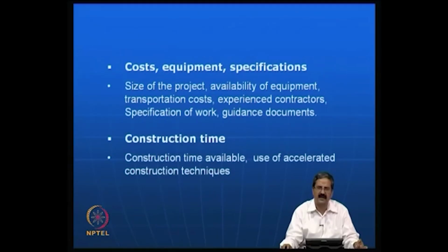There are many people in this business, and all should understand the principles of the ground improvement techniques and also how it should work in a given situation, and discuss thoroughly. So, the guidance documents will help you a great deal. Otherwise, there will be a lot of conflicts between the owner and the contractor and the supplier and the actual installer. It leads to project delays, which is again a problem. So, one needs to have good guidance documents.